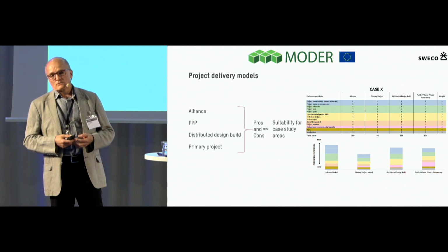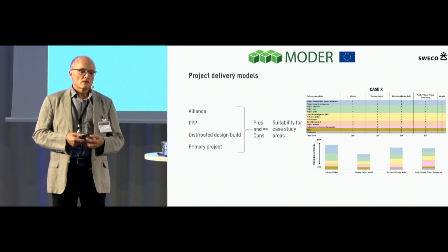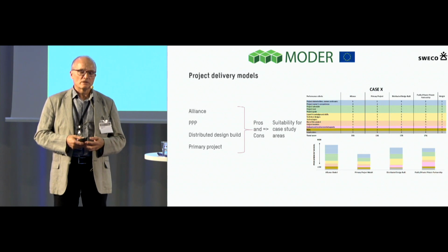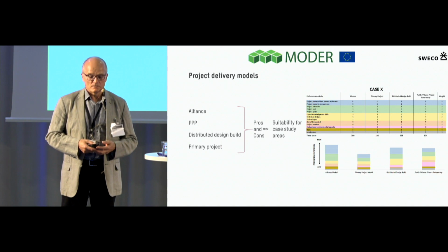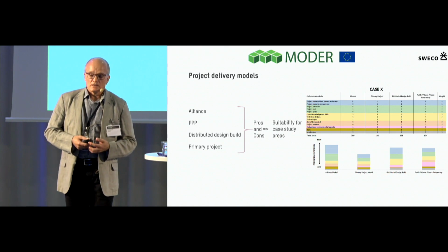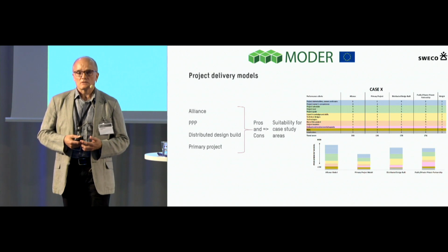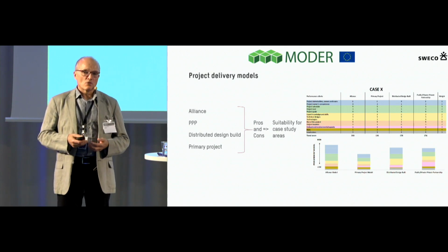The primary project means that there is one strong player who wants to refurbish the properties that they have, and then they invite other people to join. It's a little bit of a developed version of so-called group refurbishment. And the distributed design build is, of course, a design build project, but it's distributed so that each of the buildings might have their own design and construction refurbishment process, but the procurement, for instance, can be common.